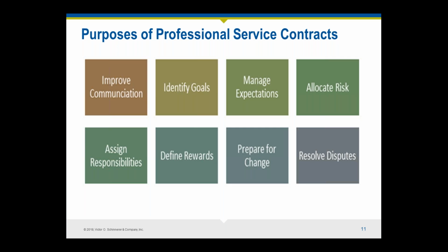Don't guess at what some terms mean. Remember that contracts are written by attorneys, mostly to be interpreted by other attorneys. And so we average people may assume that we know what something means, but there could be terminology in there. For example, things like "time is of the essence," which just sounds like, oh, time is important. Okay, that makes sense. But having that phrase in your contract may make the schedule the most important thing, so that any slippage of that schedule could result in a claim against you or even possibly termination of the contract. So if you have any questions about what a contract means, get help from somebody, from your broker, from us, from your attorney, from whomever.